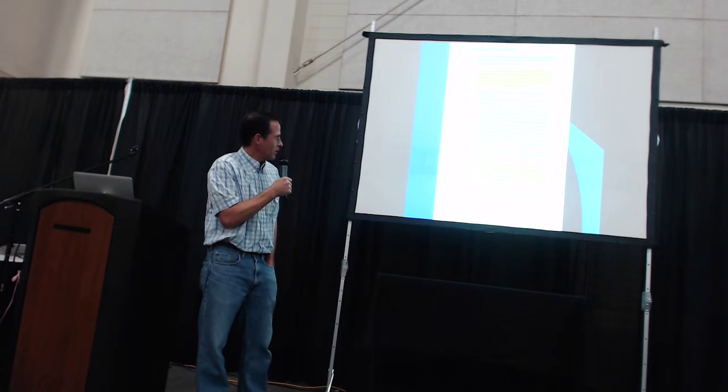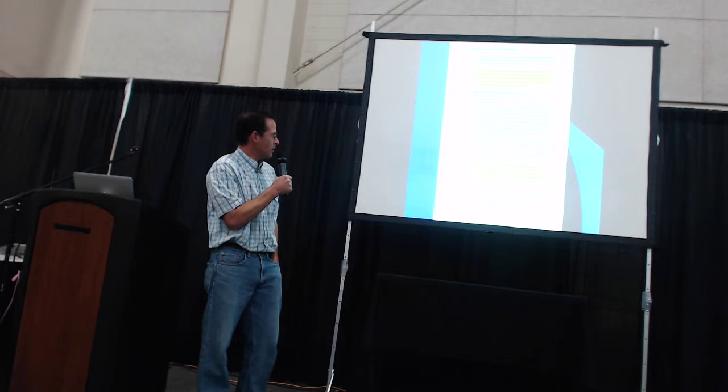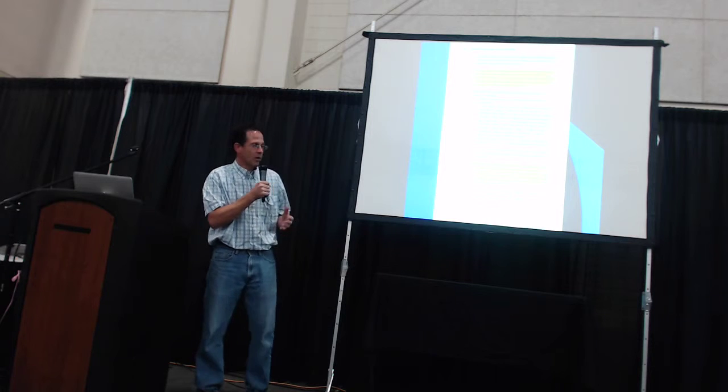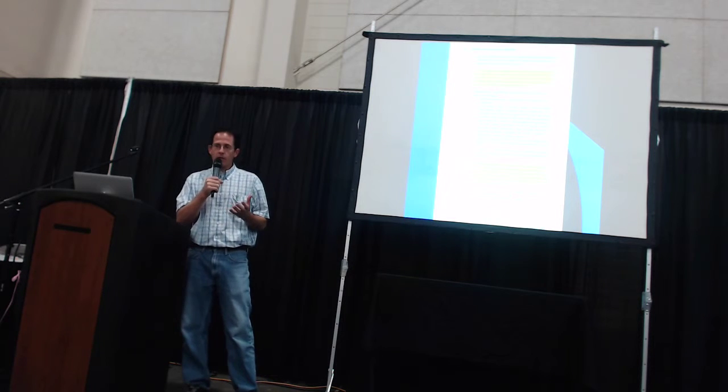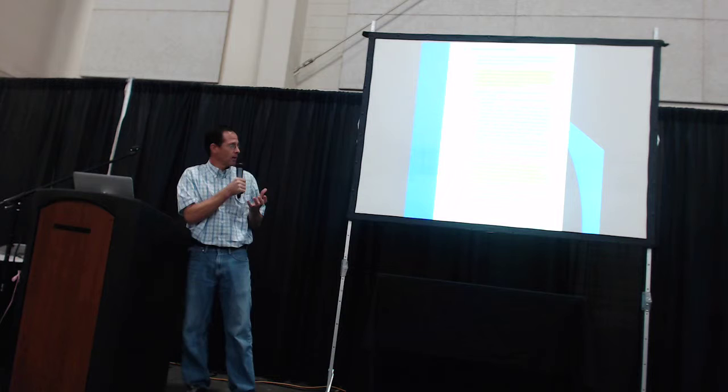Do not drive other piles in the foundation until the department gives notice that the test results indicate that sufficient capacity has been obtained and the driving criteria for the remainder of the piles in the foundation has been established. So at that point, the driving criteria consists of three things. The minimum depth, you now know what depth you need to get your capacity.